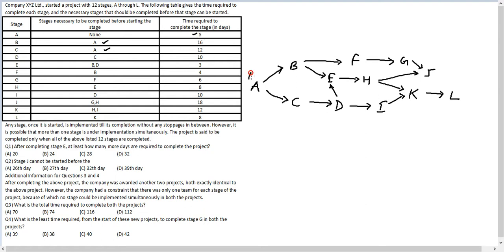Stage A takes 5 days, so it goes from day 1 to day 5. Stage B takes 16 days, going from day 6 to day 21. Stage D takes 10 days, going from day 18 to day 27.